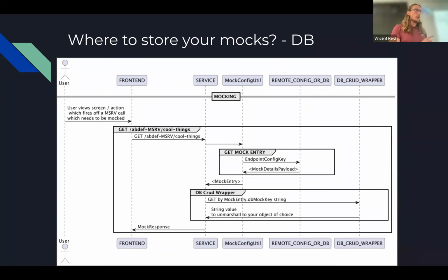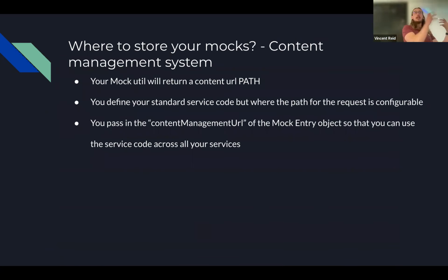And again, let me not forget to remind you for the 15 millionth time, add time to verify your mocks. Don't think it's the be all and end all. Business will want to sign off this feature based on mocks, and you're playing a dangerous game when you want to go live and take your feature live without any surprises. So make sure you buffer your project plan with verification time. So that's a little about the DB-based approach.